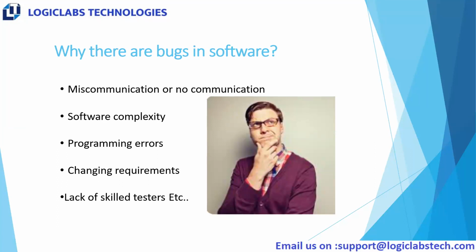Again, the testing team will have to perform testing. What will happen? We have only a few weeks. In that case, what will the testing team do? They will do very high level testing. They won't execute each and every test case because they have to deliver their product within the deadline, right? So if we keep on changing the requirement, there is a chance that a lot of issues will be there. And lack of skilled testers.